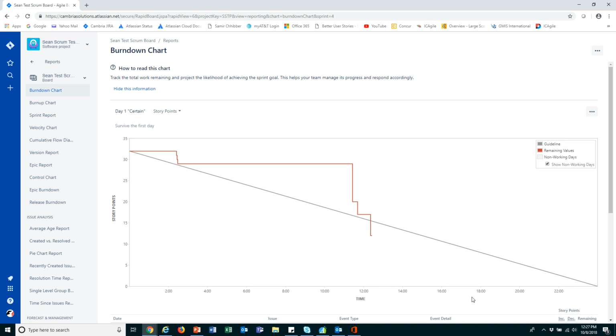But if the team member doesn't have enough time to execute and finish the story, they actually may pick up a lower priority story that is much smaller. It really depends on a number of factors. The Scrum Master can work with the team and the team member on that, as well as the product owner, to find what story is most appropriate. But looking at this gives us an indication of the health of our sprint. In this case, everything looks relatively good.